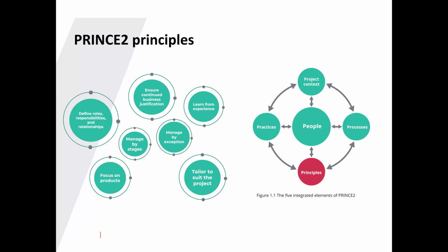Okay, so the project board will definitely be the one to make those exceptions for the project manager. The project manager can advise, the project manager can suggest, but it's still dependent on the project board to say, 50,000 pounds, do we really want to allow the project manager to do that? No, let's drop it to 5,000 pounds. Yeah, so the project manager can suggest, but it's left to the project board or the steering committee, depending on what you're using within your organization, to make that decision.